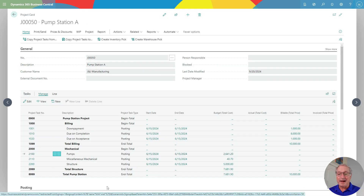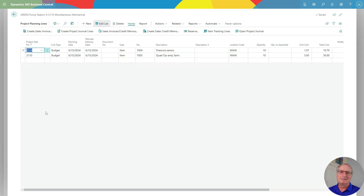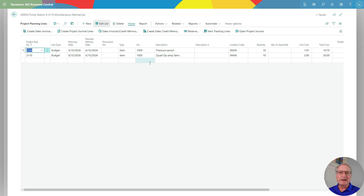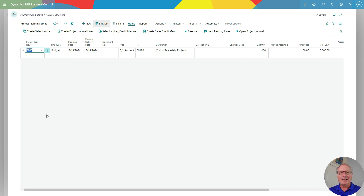Let's take a look at these other tasks. I've got a task here where I'm taking other items from my inventory to include in this particular project. You can see those right here — I've got inventory items with a quantity and cost. And here's another planning line for this particular task where I'm going to subcontract this out. I'm going to create a PO, and the cost of the PO will end up in the project.